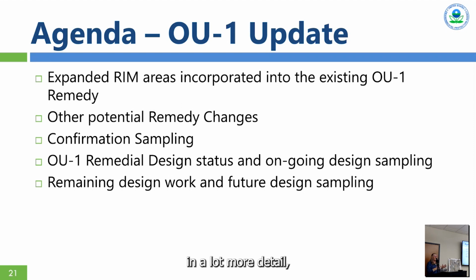Tom's going to go into this in a lot more detail, but basically we collect the data up front instead of on the back end, so we know exactly where to dig. You go in, you dig up what you confirmed you're going to dig up, and you close it up. It happens faster. There are benefits.